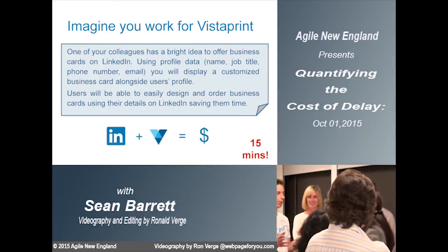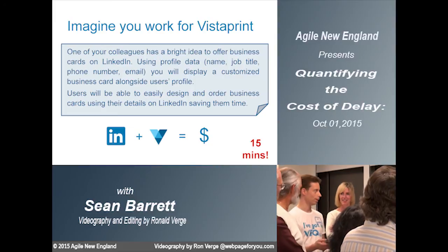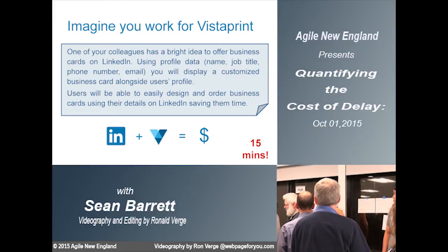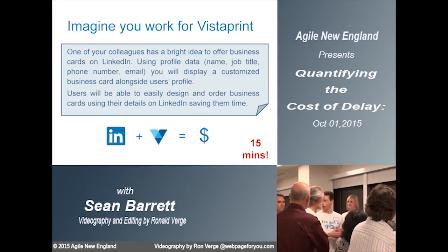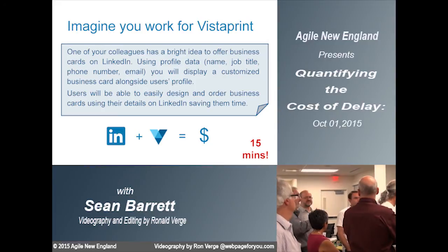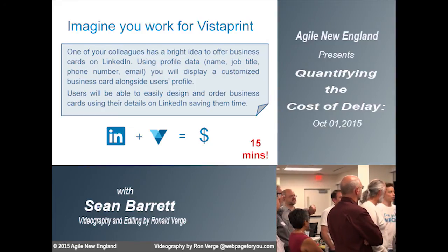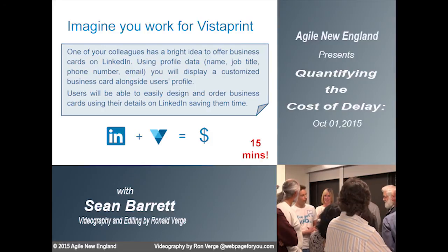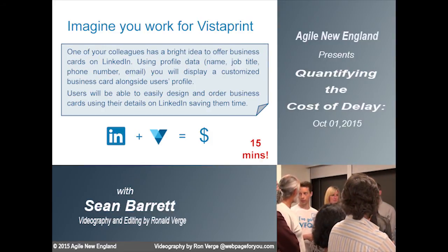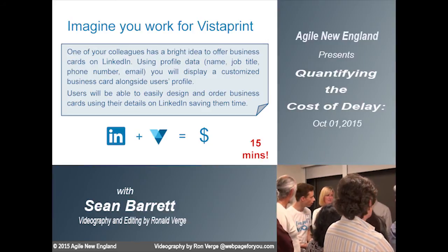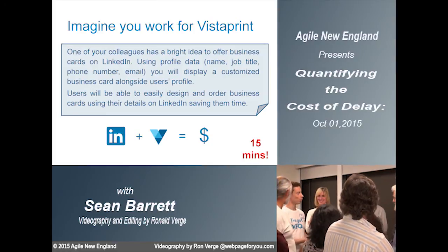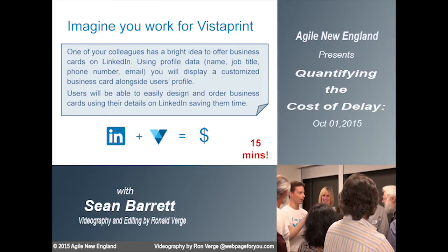A strong divergence of opinions of what a typical rate could be. That's the variable that has the most variability. So, how about parameterizing it and get it down to one thing? You draw a graph. So who here would execute a project for $5,000 to $6,000 a week? Who would execute and allocate the funding for $5 million? So somewhere in that range, you have a go no go in your mind, right?